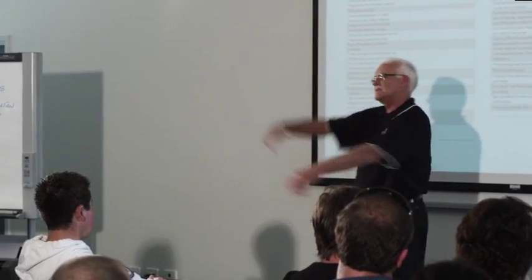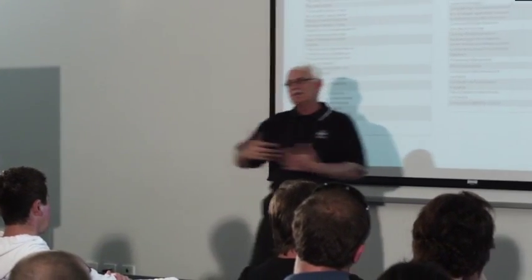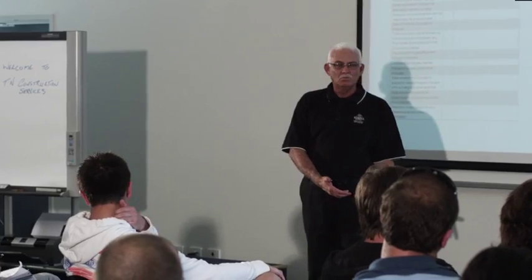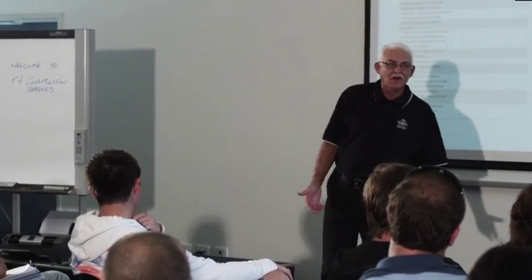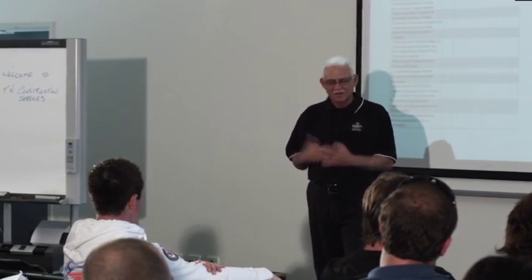I can't do anything. I've got to send all my guys away. I've then got the administrative work to get them back. When I don't know when the tiles will arrive, I've got to write out a time extension claim. I've got the administration, so guess what?